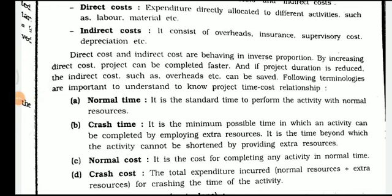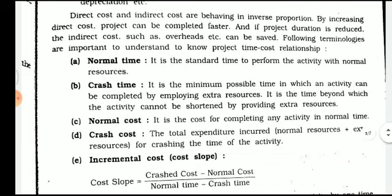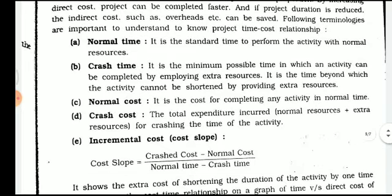By increasing direct cost, the project can be completed faster. If project duration is reduced, indirect costs such as overheads can be saved. The following terminologies are important to understand the project time-cost relationship. Normal time is the standard time to perform the activity with nominal resources. As per the normal time, the performance of the activity is due on standard time as scheduled.